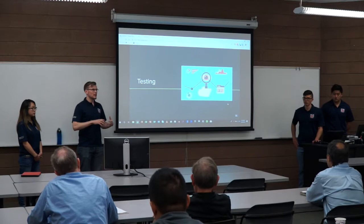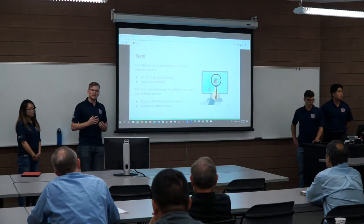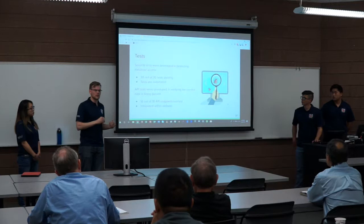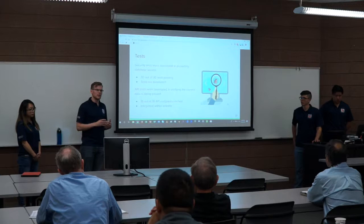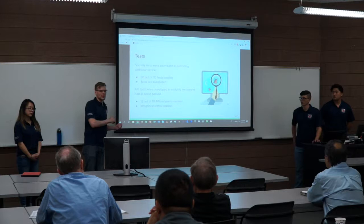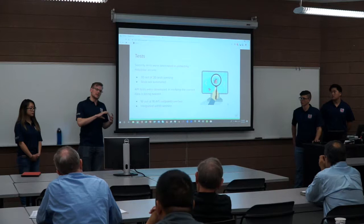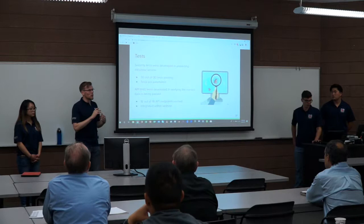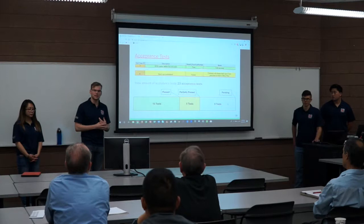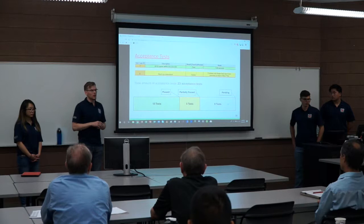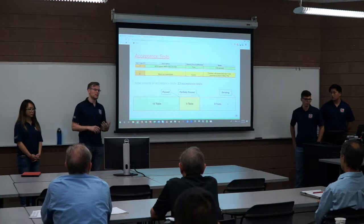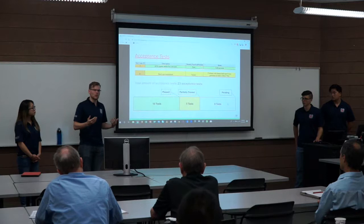Now we'll cover testing to ensure we deliver the best quality product. Security tests ensure the correct users have authorized access to the right data — all 30 tests are passing. API tests verify that correct data is passed to the website — all 18 API endpoints have been verified, and most are integrated in our website today. Acceptance tests ensure promised features have been met: nearly half are fully passing and over half are at least partially passing, with all tests expected to pass in the next iteration.